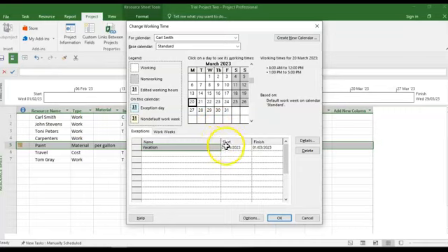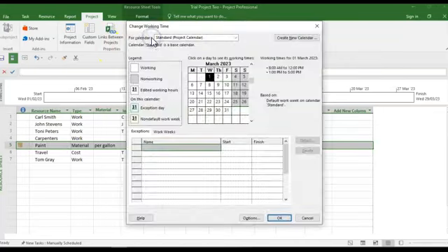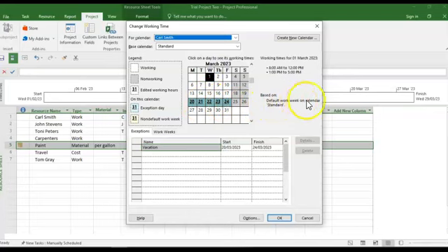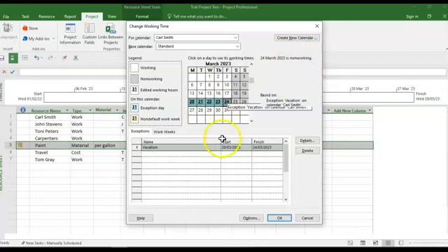And so you go to here, for instance, you're going to the 20th, you're going to click 20th, North 3, 2023. And it's going to end, for instance, on the 24th, North 3, 2023. And that exception is you click OK. When you go back into change working time, you go back into Carl Smith, you realize it has been entered. Default week on the calendar, he's not working, is a non-working day. All the vacation leave has been entered as non-working days.